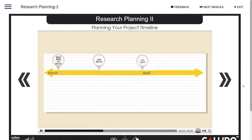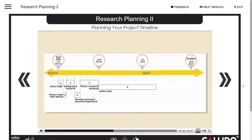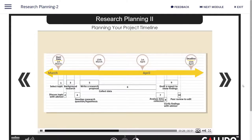Then, plot each of these tasks onto a timeline that contains the due date at the end. Adjust the size of each task box based on the duration of time it will take to get completed.